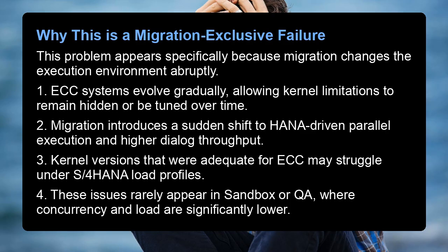Why is this a migration-exclusive failure? This problem appears specifically because migration changes the execution environment abruptly. 1. ECC systems evolve gradually, allowing kernel limitations to remain hidden or be tuned over time. 2. Migration introduces a sudden shift to HANA-driven parallel execution and higher dialog throughput.